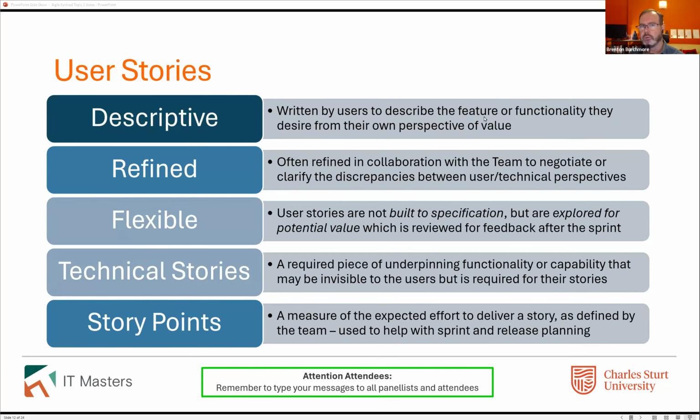And there's no rule that says exactly how big they need to be, other than that we really want to get it done within one sprint. How big is based on the story points, and that's how we calculate and estimate how much it's going to take. But they're just estimations. We won't know until partway through or at the end of the sprint whether that estimate was right or not. And that's one of the reasons why sprints are flexible.